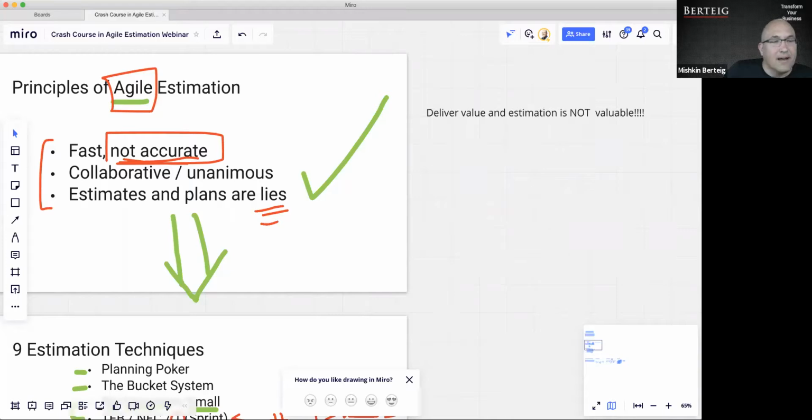All right. Team capacity is planning by man hours. Is it correct? No. Team capacity is not usually done with person hours. It's usually done with points. That's another way of describing the technique of velocity. But remember, that's not estimation. That's actually measurement. And I want to be very clear that for this webinar, we're focused on estimation.